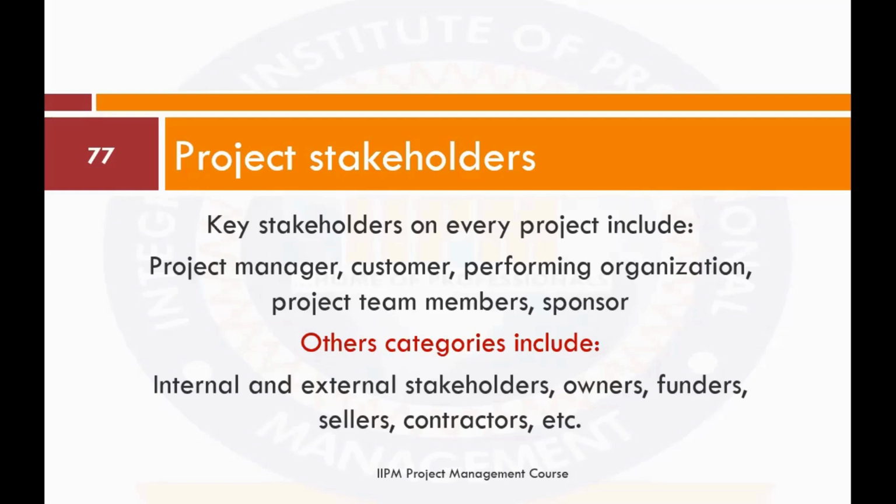I said, sir, the project, the breaking of this thing, was supposed to cost about 300,000. And I think what they were to collect was either 12,000 or 15,000 naira. So if they had done the work, they would have been the ones benefiting. I told him, sir, let's find out how much these machines will charge to break this thing. And if the difference is not that much, let's pay these guys and let them go. If they start this trouble that this English is not solving, it can soon become one that stops this project, and then we'll return back to Lagos.